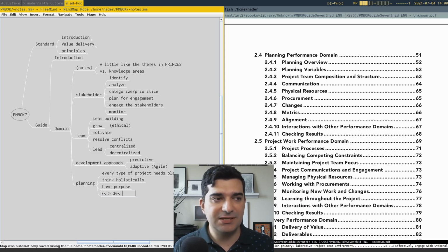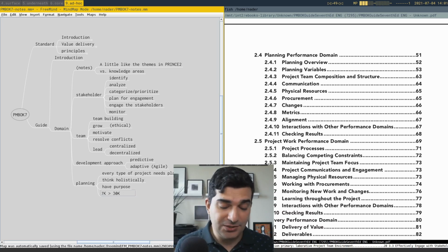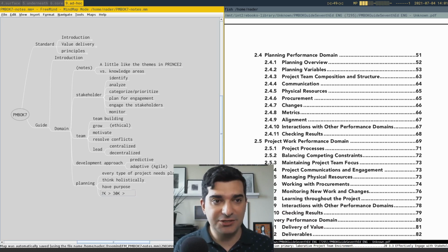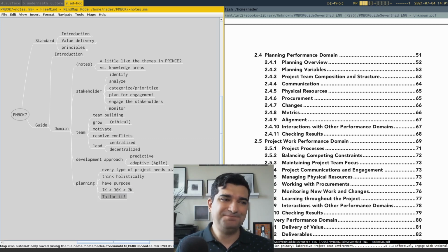And then I realized that I'm not doing it well enough. What I'm getting out of those schedules is not worth all the trouble, and our energies are best spent elsewhere. So I reduced it again, to about 2,000 to 3,000 activities. And then I was getting a better result. So remember, tailor it always.